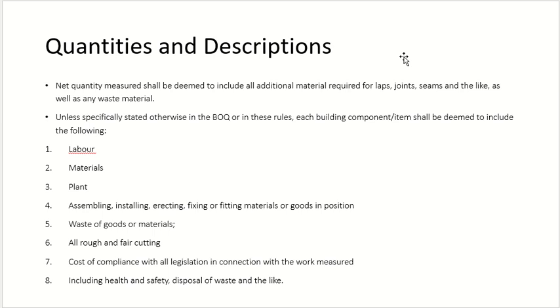Every drop of concrete you do, he will be there, right? He will do some tests and some surveys. You don't believe anyone. Testing, not investigation. Okay? Testing and surveys. The cost of this is not for free. The cost of testing and survey is part of quantities.